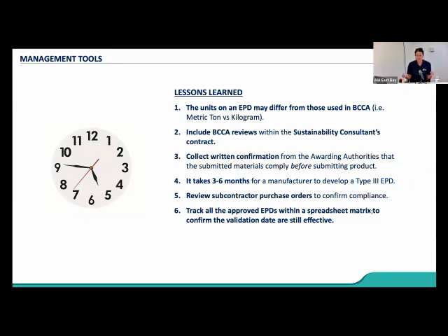And know that if you are doing your due diligence early on and you know that one of your intended suppliers does not have an EPD, anticipate it taking about 3 to 6 months at least for them to be actually getting that EPD. So we're not saying that you can't use somebody who doesn't have an EPD, but you have to really do some aggressive pre-construction efforts to make sure that by the time of procurement that they do have an EPD in hand.